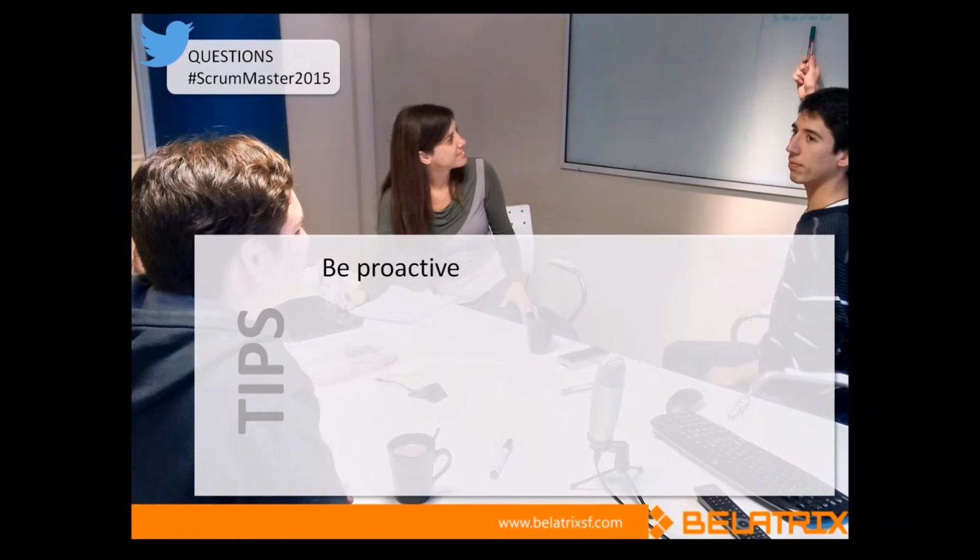Another one is to push the product owner to have user stories ready before the pre-planning. In this way, the team can get together to review them, analyze them, and prepare questions. Once the pre-planning is done, it will be more productive, because the questions will be there and they can discuss with the product owners and everyone there, who sometimes are not always available. So try to do it. Try to force the product owner to do that.